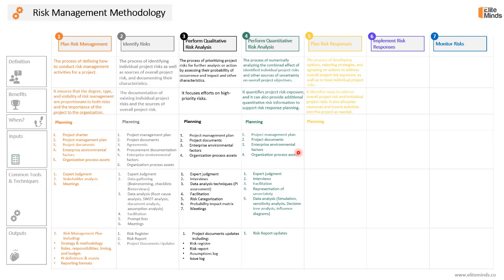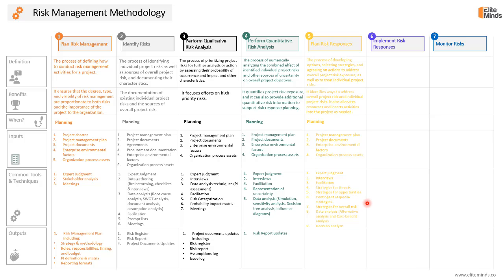Plan risk responses is the last risk management process in the planning phase. We will use the project management plan — specifically the risk management plan — as an input. We will also use project documents like the lessons learned register, project schedule, risk register, risk report, and stakeholder register, along with enterprise environmental factors and organizational process assets. Tools and techniques include expert judgment, data gathering techniques like interviews, interpersonal and team skills like facilitation, and best practices and strategies to deal with threats, opportunities, and the overall project risk.